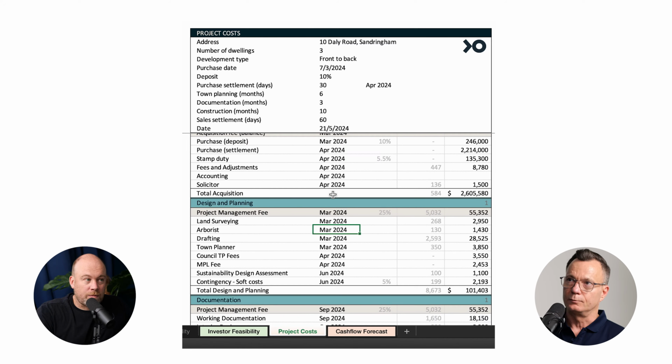What I can later do is extrapolate the information out of this with a pivot table and create a cash flow forecast, which can then be presented to clients if needed. We don't do it that often, but for investors, it provides me with the ability to provide not just a cash flow chart, but I can summarize it and say, look, the investors will have to pay X amount in this month of this year, and then maybe in 6 months you will need X amount at that stage as well. So it just provides them with a forecast of when they need to consolidate their cash or their inputs, and also organising finance.